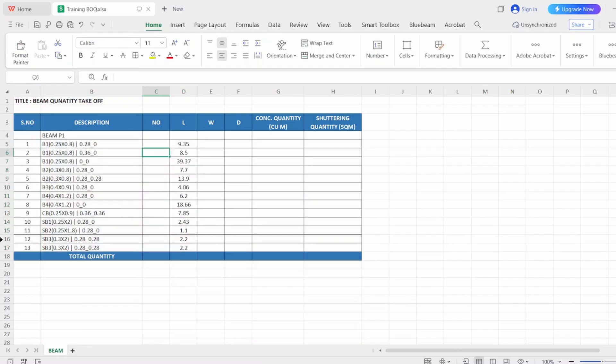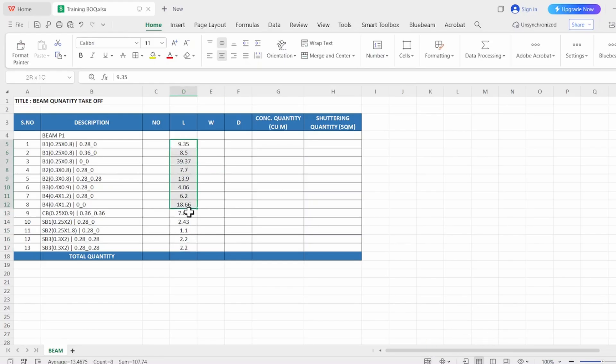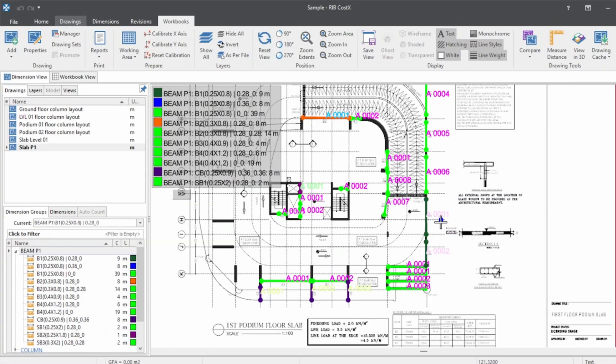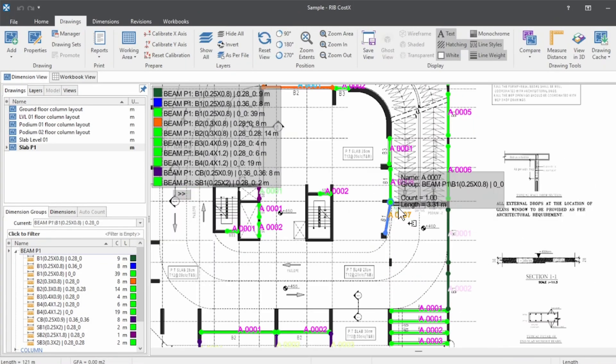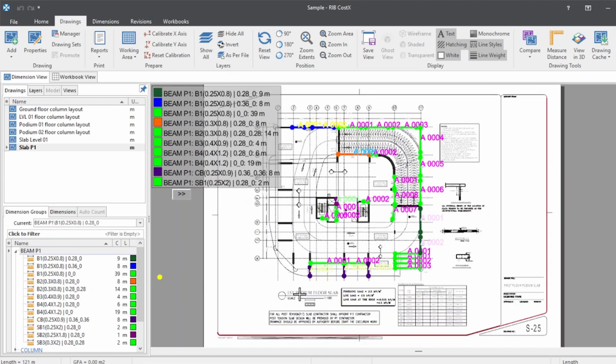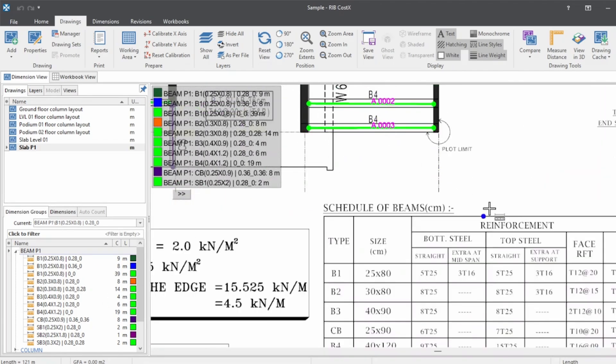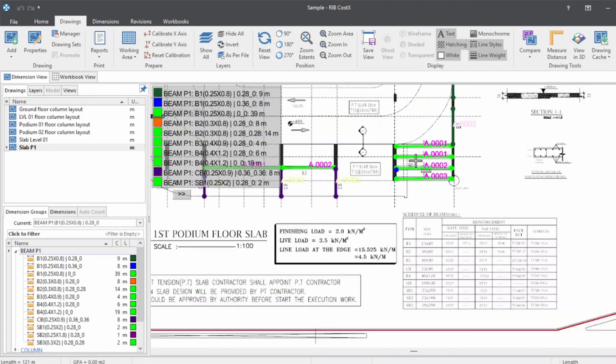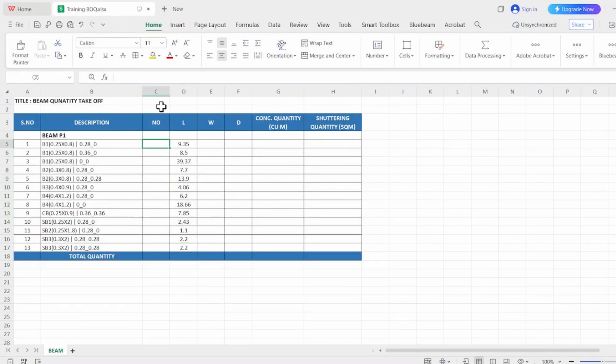So this is the takeoff sheet. Just copy, copy values, paste it here. Yeah, now we have prepared an Excel sheet with the data. So these are the data we got from the CostX. The changes that we are doing in CostX will never be reflected here. So once you finalize your measurements and double-check the beams, double-check the descriptions, thickness of the beam, any beams that are missed out—everything—after that, you just take the data to the external workbook.